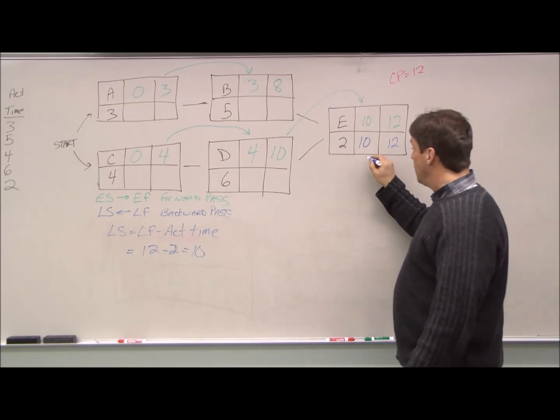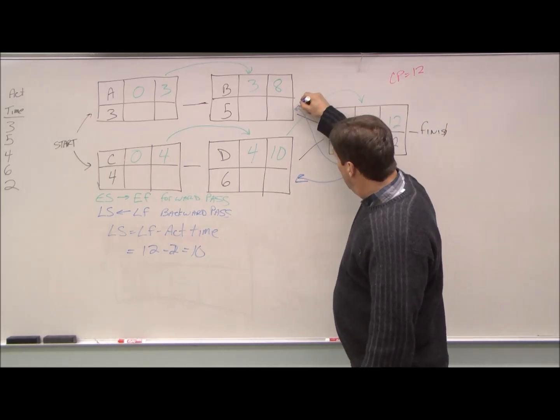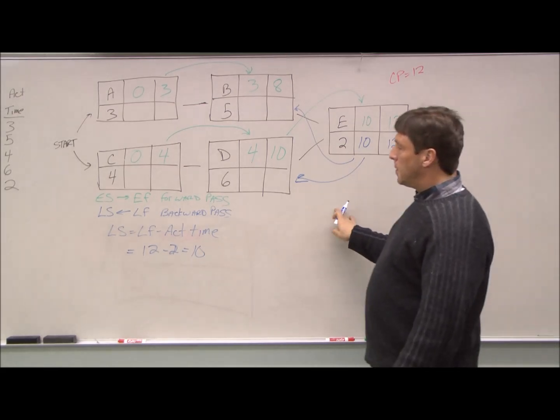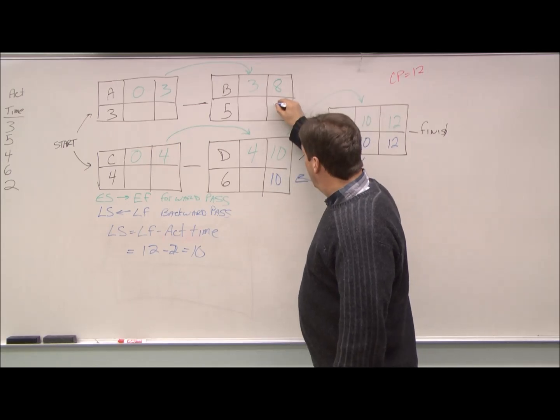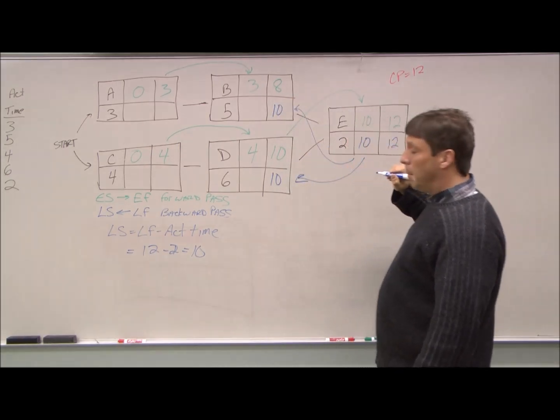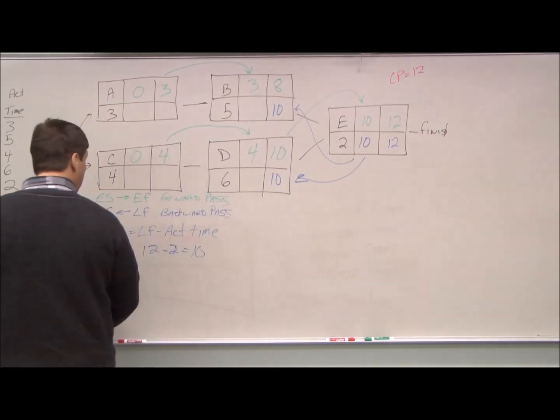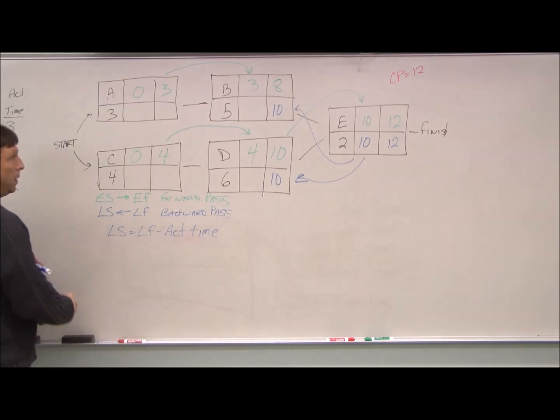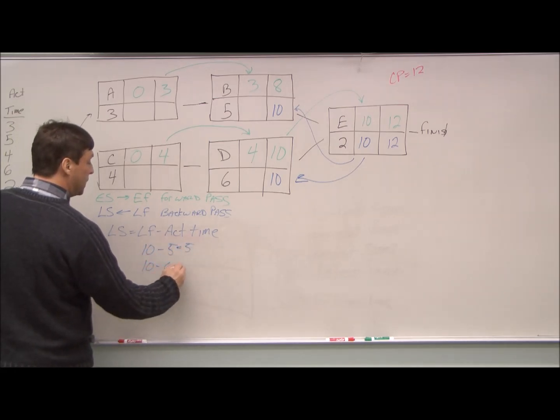Now this goes two places. This goes to our latest finish of our two immediate predecessors here, the operations that come before us. So that's pretty straightforward. We just bring it straight back. We do the same thing. We calculate the latest start. So we have ten minus five equals five. Ten minus six equals four.